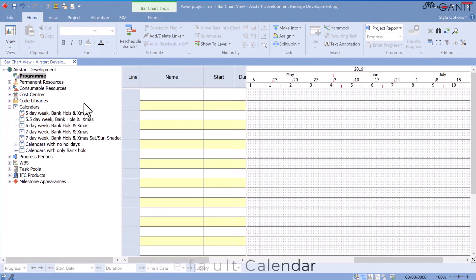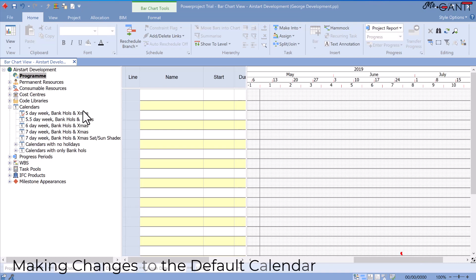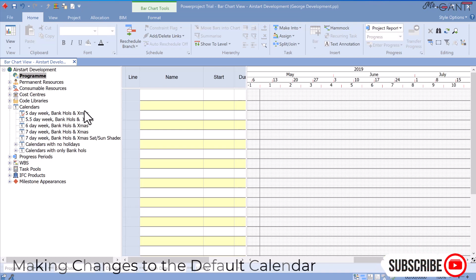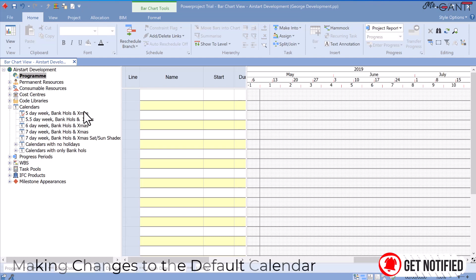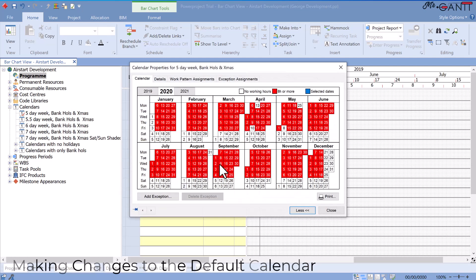Making changes to the default calendar. You should change the calendars in a project to ensure that they represent the project's particular working hours. Right-click the five-day week bank holiday and Christmas calendar to alter the default calendar.